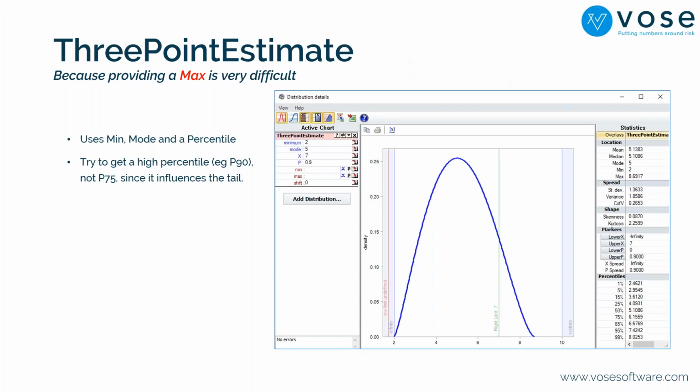All right. So distributions. What distributions are we going to use? Well, I've committed something of a sin in that I've shown you the triangular distribution in the first example. In fact, the triangular distribution is one of my least favorite distributions. The reason is that it doesn't really have a shape that naturally reflects the real world. When you look at a triangular distribution, it has a straight line that goes from the maximum to the most likely.